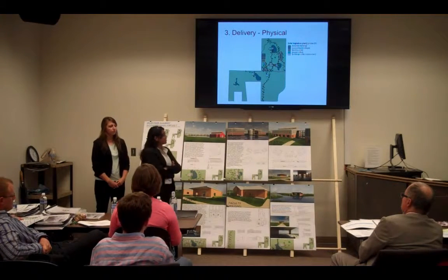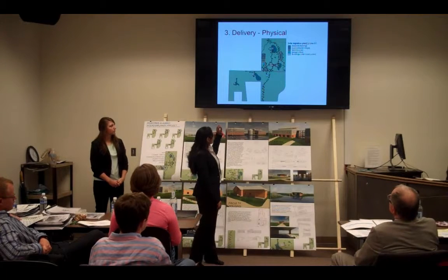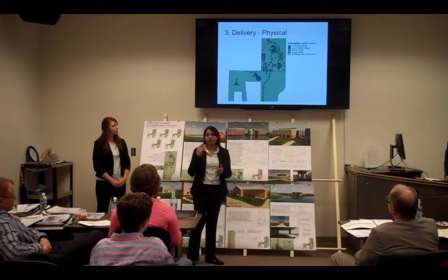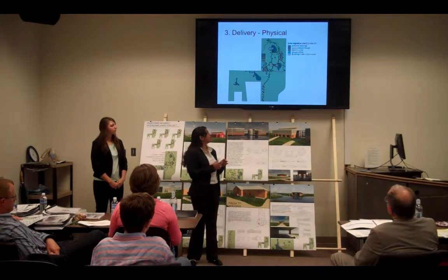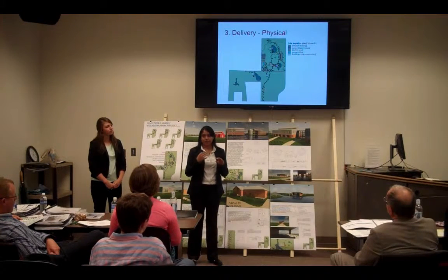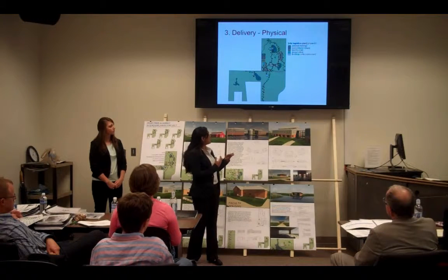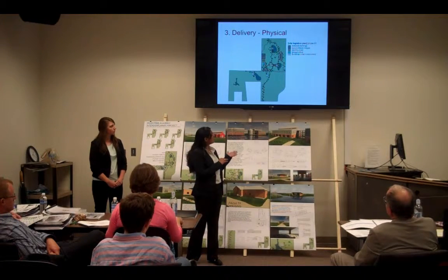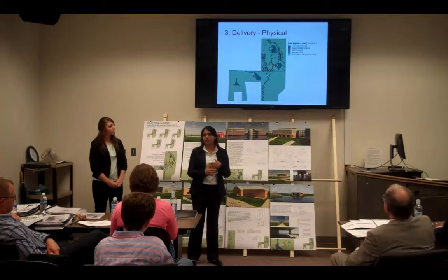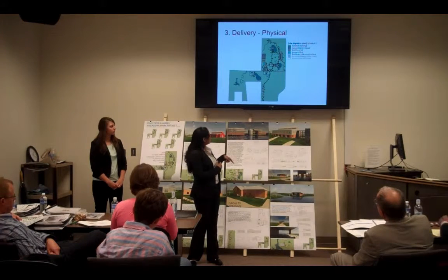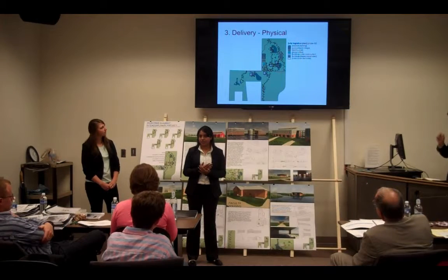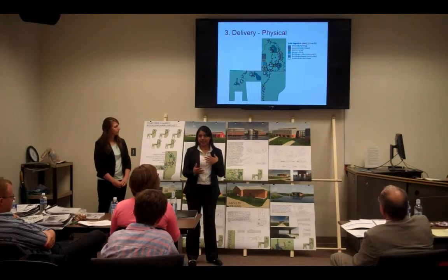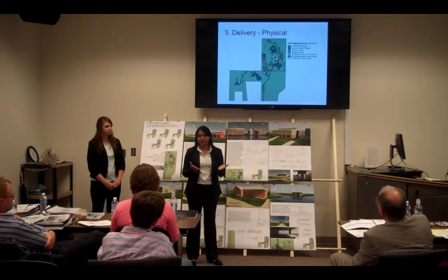Coming to the site logistics plan, there are 3 different regions: one for the material logistics, one for the subcontractor region, and one for the parking areas. All these 3 are provided with a separate access road so that they don't disturb the other areas. And during the first phase, we're going to use the clubhouse as the project office. And coming to the next phase, to ensure the safety of children, we're providing barricades around the ongoing projects.